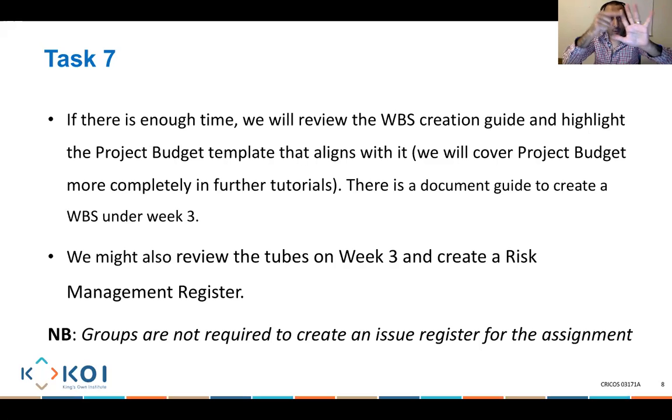Each of them will consume time, will cost me time. Each will have a start time and end time. Once I finish all of these 7 tasks, I say quiz 1 completed. That's my milestone. You understand how I moved from a high level all the way to detail to assign people to the activity, which is you. You will need to do the quiz.